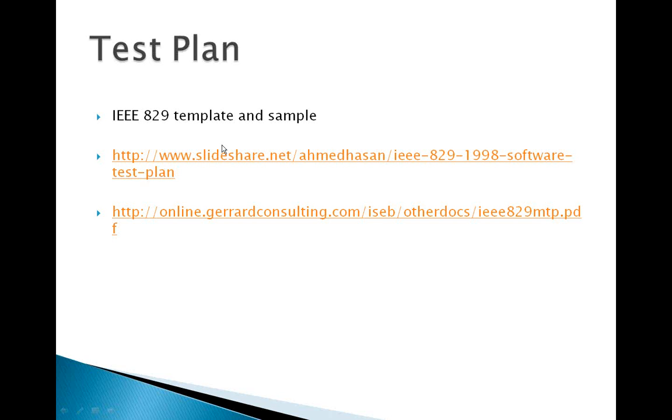For a given feature, collectively everybody has to work, and until each team's work is done, the overall team doesn't get those story points. For example, if the developer delivers a feature but the testing does not get completed in that sprint, you will not get the story points, so the velocity of the project will not be good.